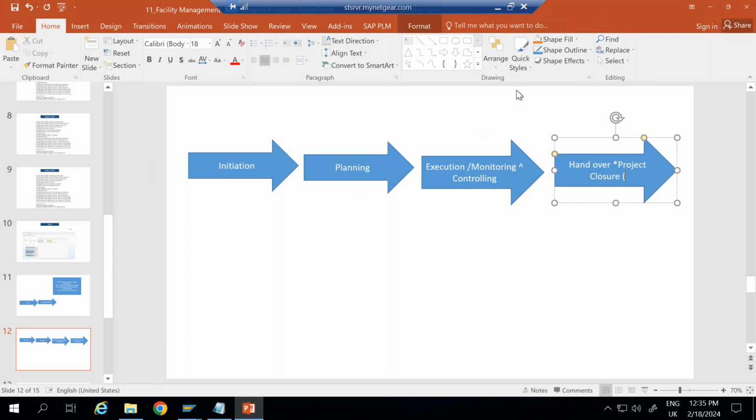And once it is done, then it is going to the planning phase. In the planning phase, we are doing the cost planning: based on the requirement of material, manpower, and other resources, what is supposed to be my cost for this project, and then this cost goes for approval. Once it is approved, it becomes a budget. So if the cost is, let's say, 10 million USD, and your budget is approved only at 9 million USD, this means you can put only 9 million in the system, and it will control it. So we are having budget control in the project system.